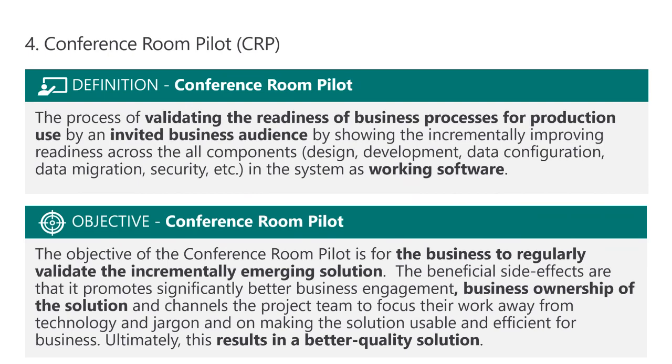Now, the business is not signing their life away, right? This does not remove the need for user acceptance testing or SAT or whatever other test cycles that you might have. We're actually going through with your hands on the system and validating it. But what it does is it makes sure that what you're delivering is not going to be a surprise for the end users, right? This invited business audience is not the people that are seconded from the business to your project, right? These are not SMEs. The invited business audience is your end users. These are the business owners of a given work stream. These are people that do this process day to day in the business, right?